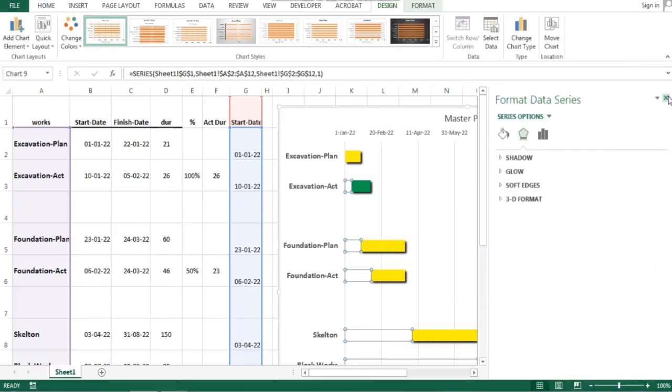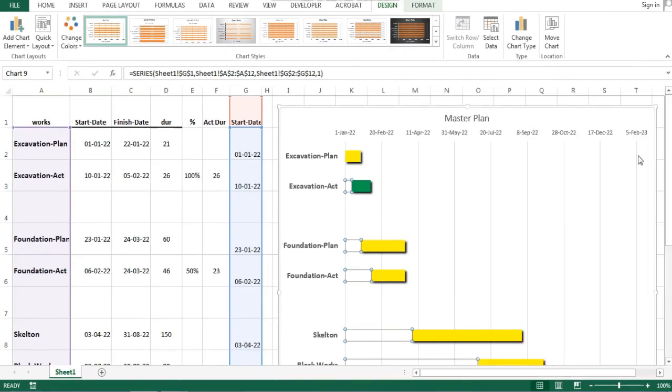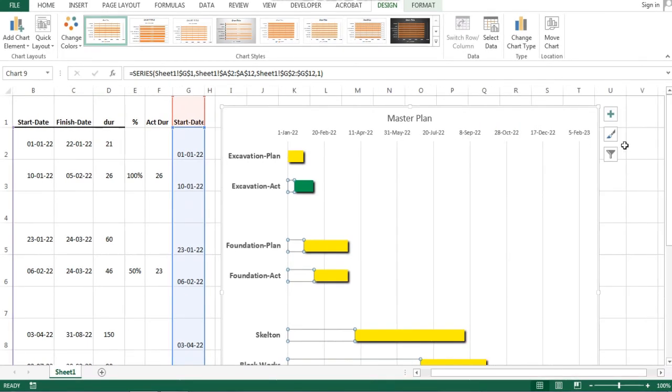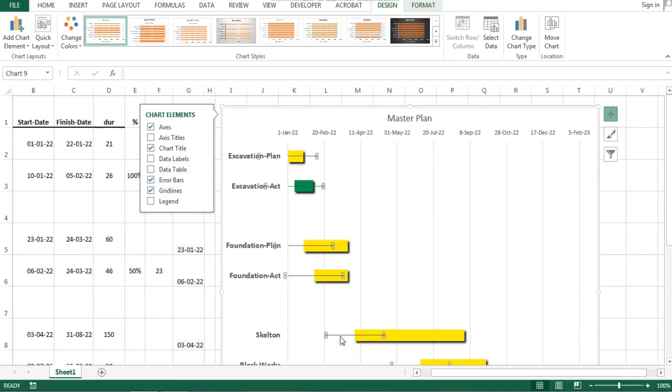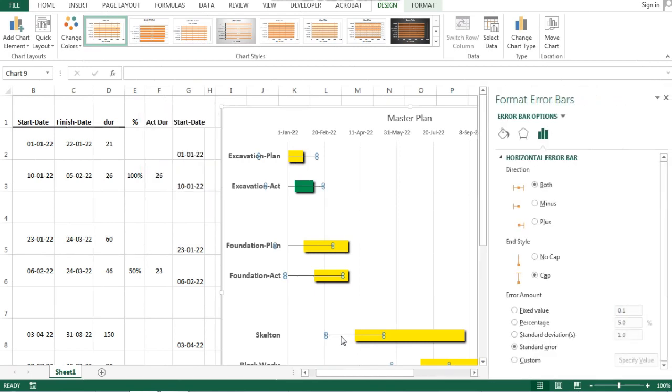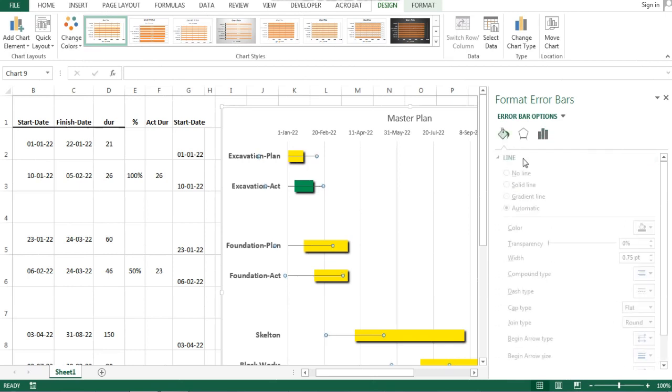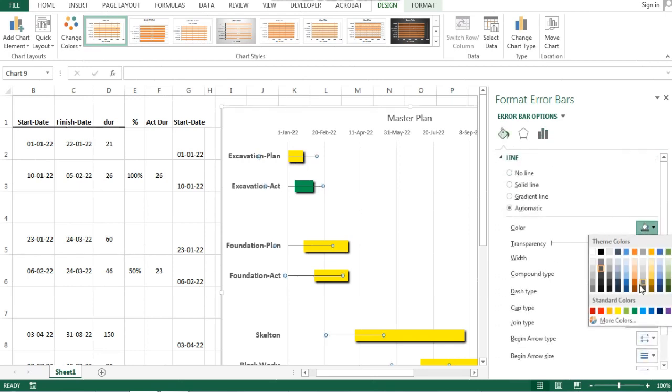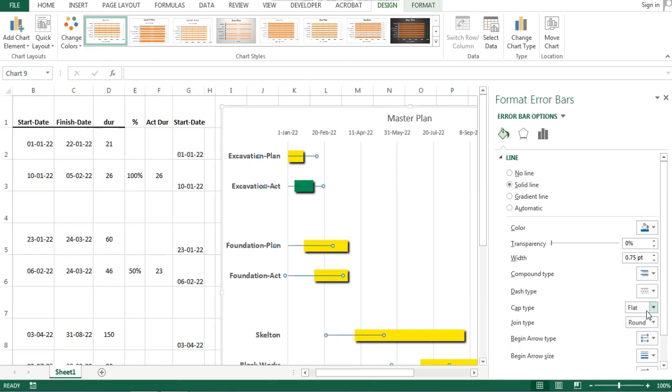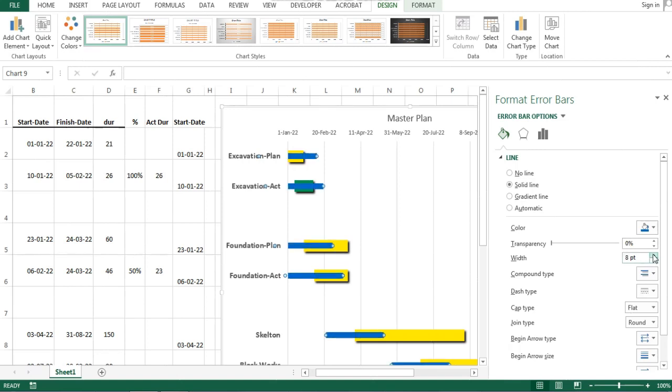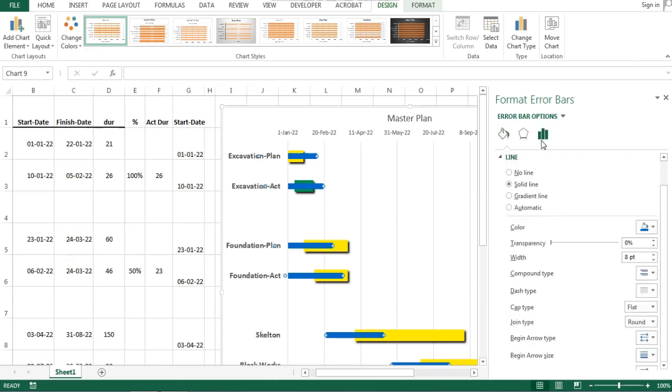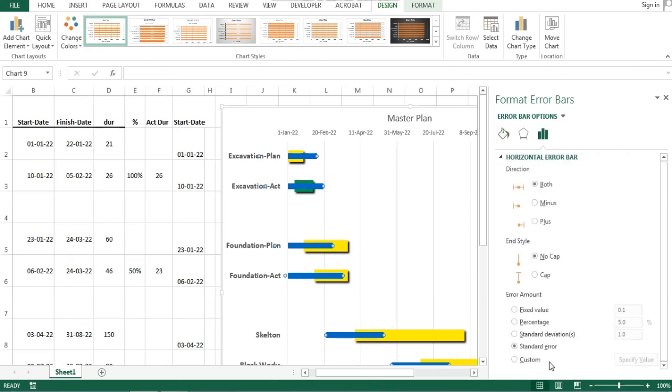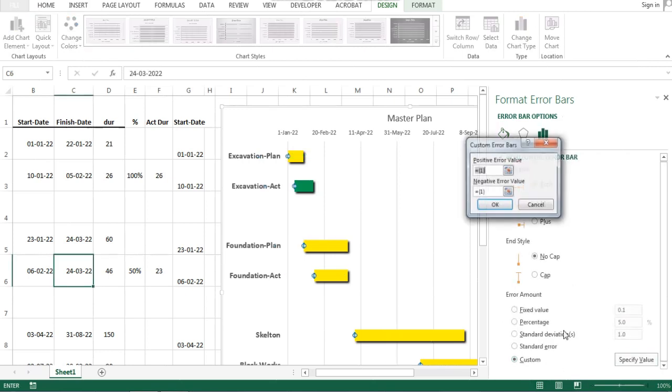Finally we are going to represent the percentage of completion and the actual status of the duration needed to execute the task. We will go to the chart and press on the first bar which is hidden by canceling the color filling. Add error bar from the chart elements list. Press on error bars to make some modifications in the settings. Modify the error bar color and width to be visible enough. Go to error amount and specify the value from custom. Choose the column that represents the actual duration. Change the color for the progress activity to be the same color.